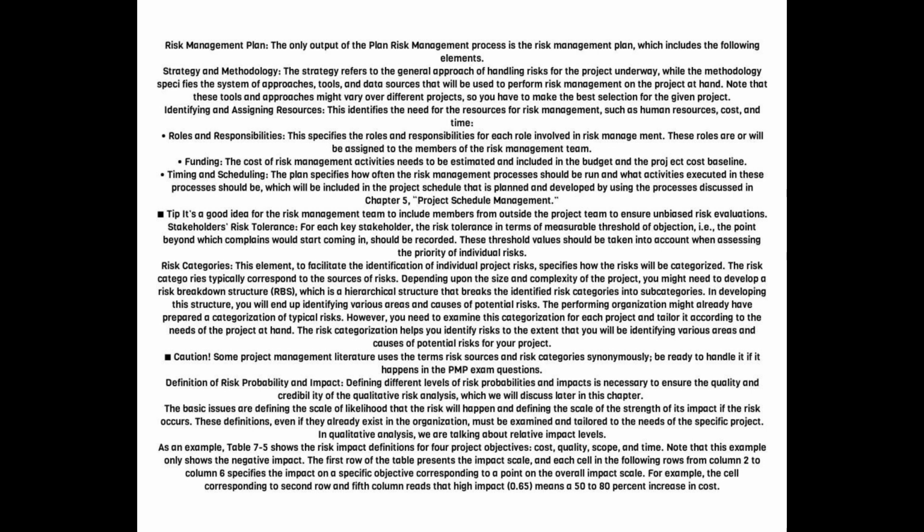Note that these tools and approaches might vary over different projects, so you have to make the best selection for the given project. Identifying and assigning resources. This identifies the need for the resources for risk management, such as human resources, cost, and time. Roles and responsibilities. This specifies the roles and responsibilities for each role involved in risk management. These roles are or will be assigned to the members of the risk management team.